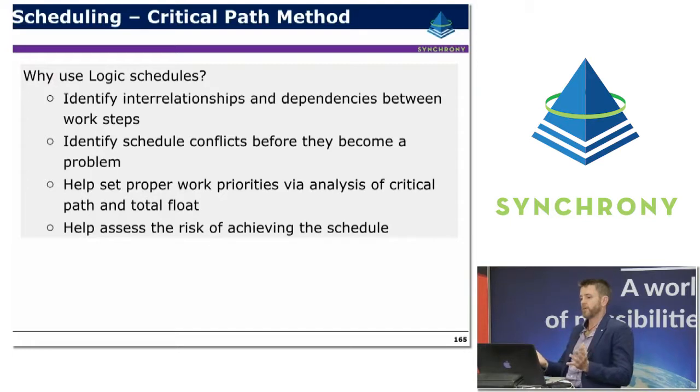The other thing that the schedule model does is it helps us assess the risk of achieving the schedule. There are some awesome tools out there now that allow us to incorporate range analysis and risk within the schedule to help give us a sense of the confidence level that we can have in particular dates before we set the baseline schedule. So if you're running risk workshops and you're using Monte Carlo analysis or PERT within your schedule, ideally